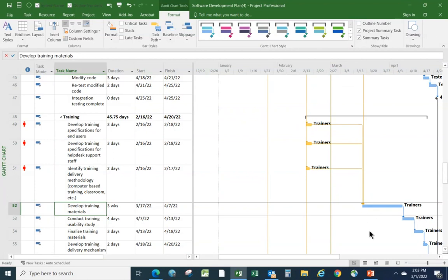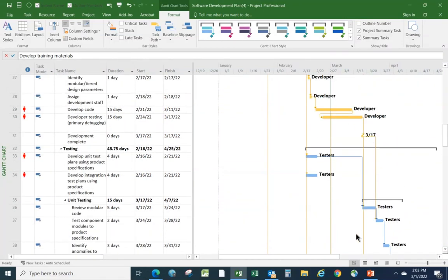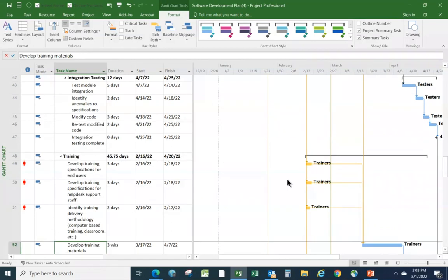But not all of those are what are driving the date of task 52 to be what you see there. Only some of those are. These, for example, are not driving it. It's these tasks up here which are driving it. Now, we can almost see that just by scrolling up and down. But if you had a very complicated schedule, you might want to do one other thing. You might want to say, okay, I want to see everything which is upstream, all predecessors, but I also want to know which ones are driving it and which ones are not.